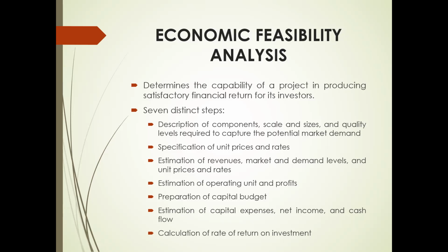Publications which contain industry average performance statistics can help in estimating these operating costs. And there is greater individual accuracy when the forecaster is familiar with the type of business under consideration and when detailed staffing schedules and other operating standards are developed for the project.